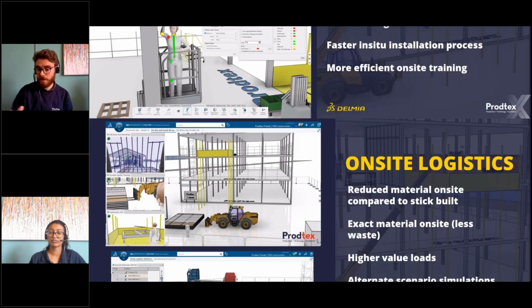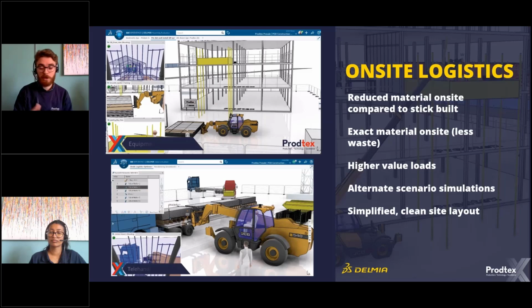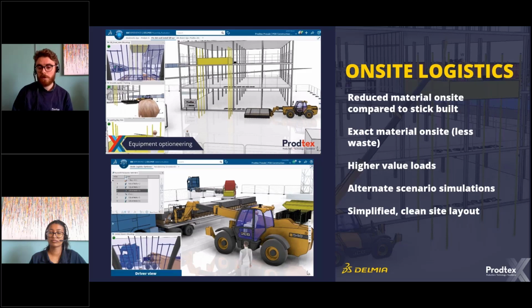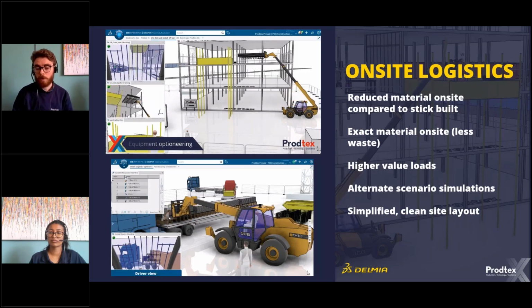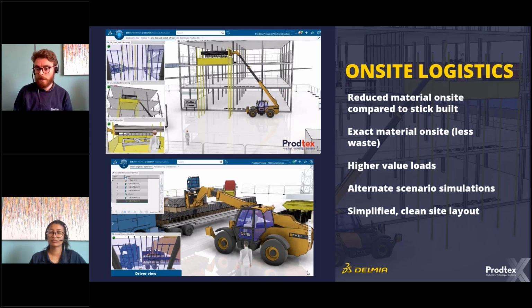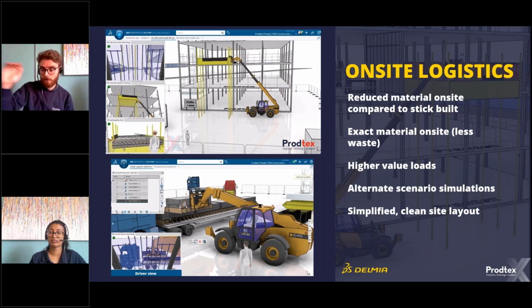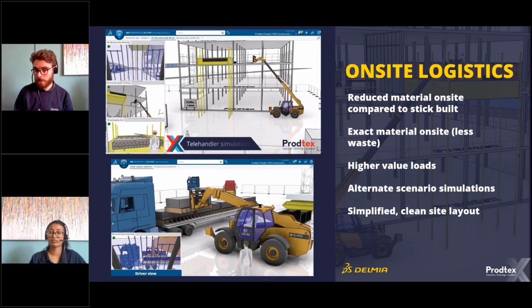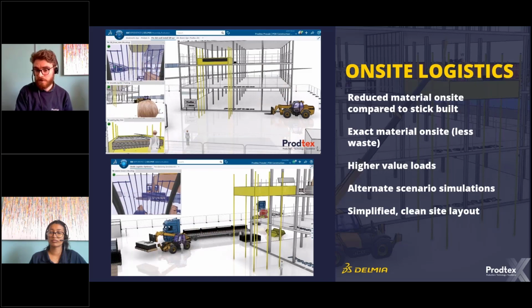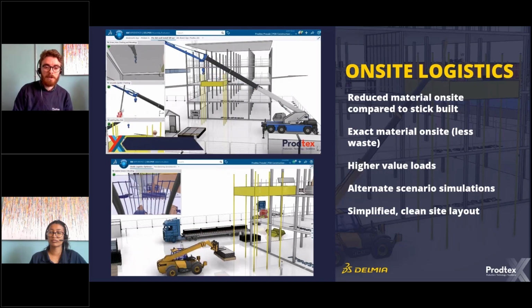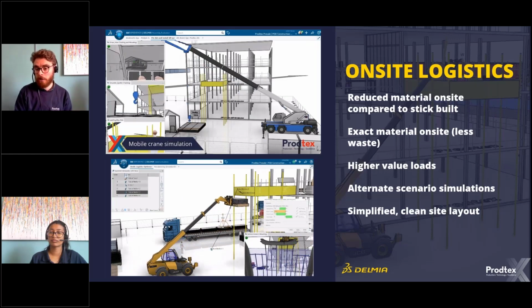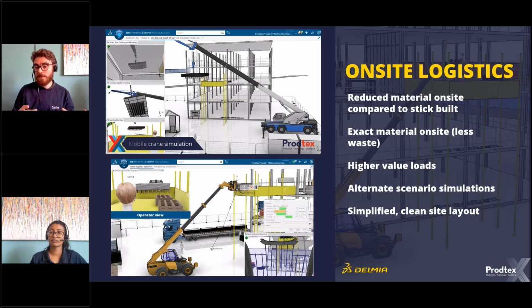Cool, so that's worker safety. We've checked this to make sure it's safe and happy, and we were able to communicate those issues. The second big thing, which for me is often missed in new product evaluation, is the material flow. We understand material flow of traditional construction because it's lifting pallets of raw material up to a floor or a location, and we've been doing that for decades. So that's well understood, though there are still some optimizations to be made there. Again, check out our earlier webinar to see some optioneering on that. But for this prefab product, we need to really evaluate that, because the product is way bigger.